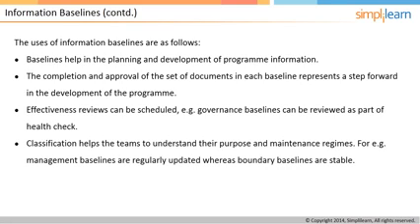We have classified the documents into 3 different types. Classification helps the teams to understand their purpose and maintenance regimes. In other words, it helps the teams to understand the purpose of each document based on the classification. For example, management baselines are regularly updated, whereas boundary baselines are stable.